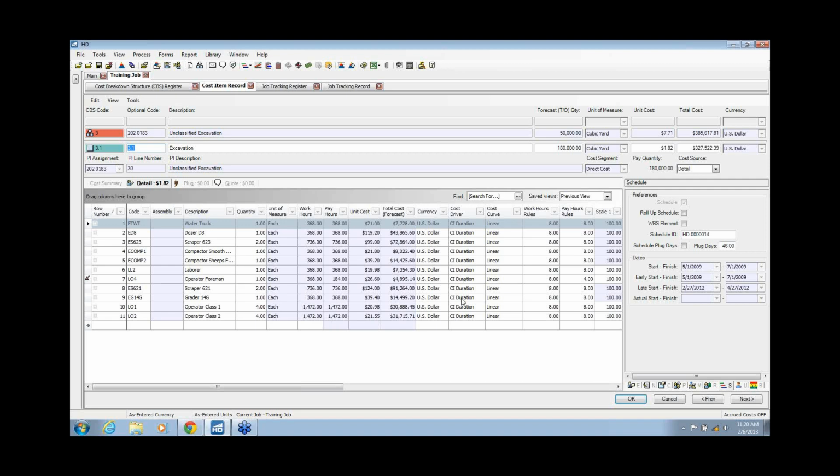And they're all duration-based. What that means is that from a schedule perspective, when Eric shows the schedule on the scheduling side and we make changes to the schedule, if there are any duration changes, then all my costs will change too. The effect of those schedule changes could have a cost effect on my hard dollar cost on this side of the fence. So those things are tied at the hip the way we have it set up here.